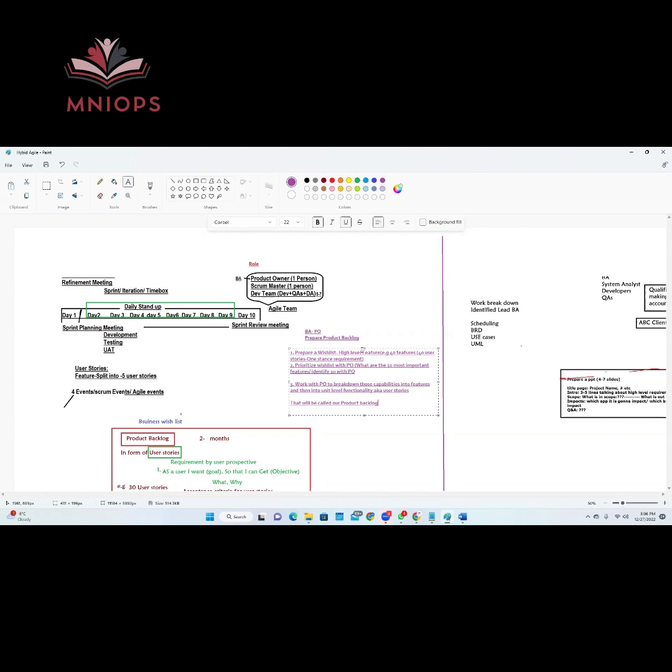Ask those questions and keep noting down the features or capabilities that they mention. And then secondly, when you have all those documented, prioritize: out of these 40 or 50, whatever the number, what are the 10 most important that you want to see first.